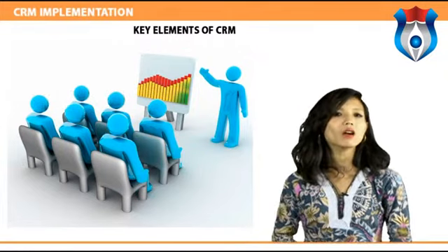Vision. During the vision phase, we typically engage a wide variety of employees throughout the organization to discuss the key challenges the organization is facing and present how a CRM solution can resolve these challenges. It should also be ensured that key stakeholders and senior executives share the same perspective and the general project goals and objectives are aligned. A high-level communication strategy and implementation roadmap will be created at this stage to set the milestones throughout the project.